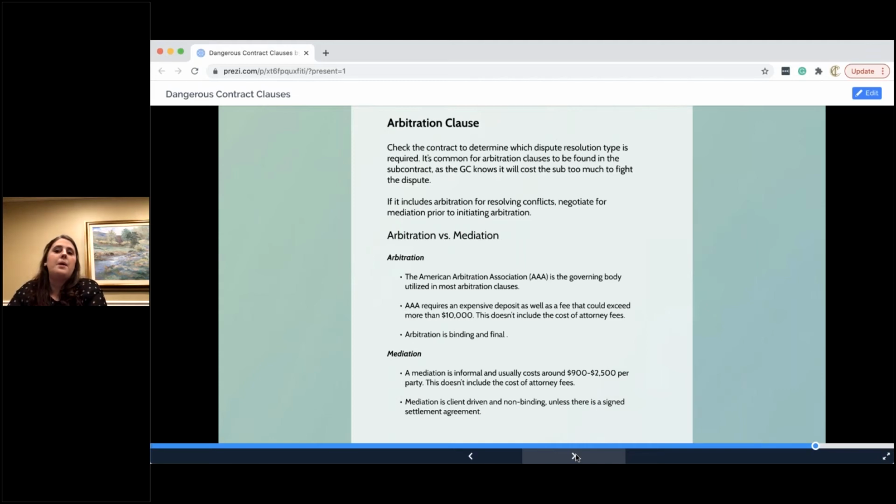So let's say you're paying me $200, $300, $400 an hour to litigate your case, and I keep having to get the arbitrator involved. They keep having to read all of my documents. They keep having to make decisions. We have hearings, we're arguing. Now you're paying for the arbitrator's time as well. And I guarantee you, because they're experienced, they are expensive. So their rate is probably $500-$600 an hour.